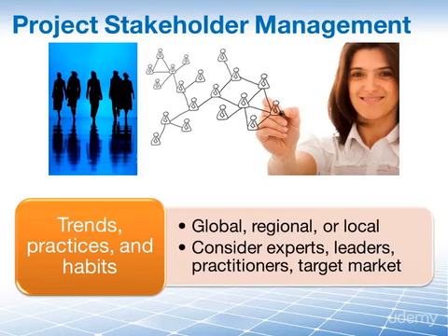And for the identify stakeholders process, you need to consider whether additional stakeholders are required, such as experts, leaders, or practitioners of that particular trend, practice, or habit. You may want to have a member from the group whom you are targeting for your project. For example, if you're launching a new product for teenagers where you plan to use internet and mobile phones as marketing channels, you cannot ignore the growing trend for this age group towards online social networking. So you enlist experts or those with experience in that subject matter.